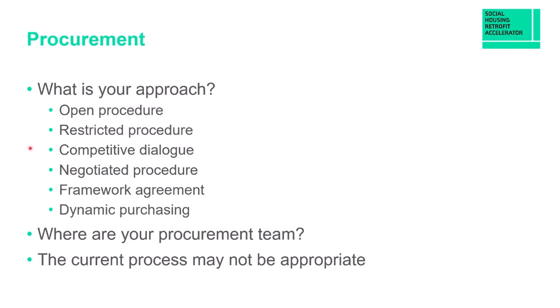This is where you use an initial process to identify the most likely suppliers and then engage with actual dialogue with them about how the project can be delivered. Bring their expertise into the discussion. So you're stating what you're looking for, the outcomes you're looking for, and seeking their help in the best way to go about it. And then by dialogue, you can reach a conclusion that's satisfactory to both sides.